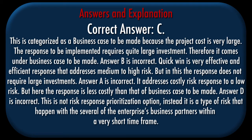Correct answer: C. Explanation: This is categorized as a business case to be made because the project cost is very large and the response to be implemented requires quite large investment. Answer B is incorrect — quick win is a very effective and efficient response that addresses medium to high risk, but does not require large investments. Answer A is incorrect — it addresses costly risk response to a low risk, but the response cost is less than that of business case to be made. Answer D is incorrect — contagious risk is not a risk response prioritization option; instead it is a type of risk that happened with several of the enterprise's business partners within a very short time frame.